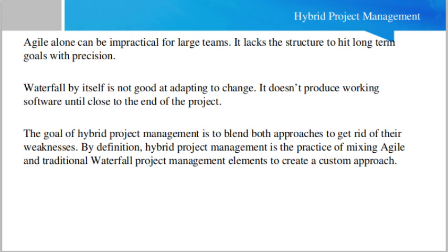Waterfall approach is the traditional approach in which we do all the things in a sequential way, like planning, development, testing, and production deployment, okay. So if we talk about waterfall, we cannot go back to the previous stage. We have to complete one stage of a project and then we start the next phase. Like after completion of planning, we start the development. After completion of development, we start the testing, okay. So this is the methodology which we use for waterfall.